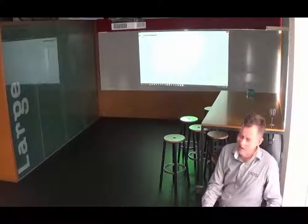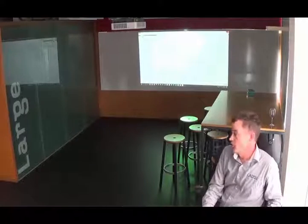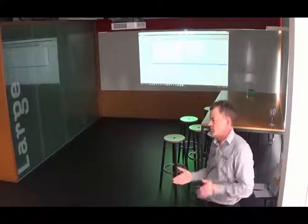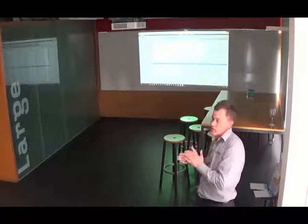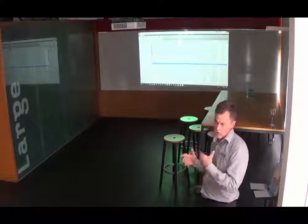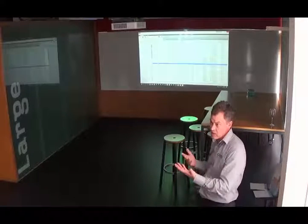So how do you ensure the prices are correct? It's your job. You've got to maintain that. There's prices of materials, and there's prices of times associated with fabrication and installation, and you've got to make sense of that, whether you work through the SMAC catalogue and work that way.